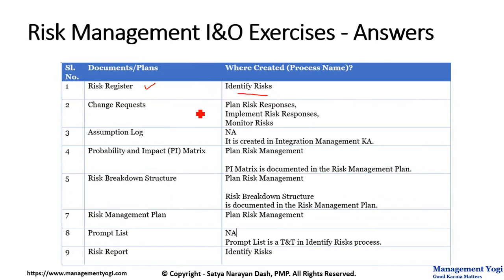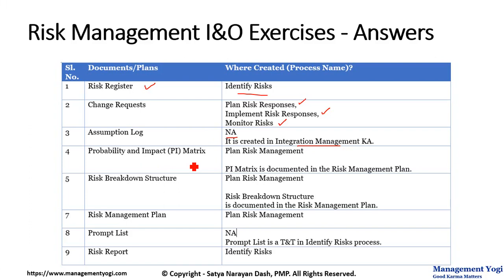Change requests are documents, though they are separately mentioned in the PMBOK Guide and other standards. Change requests are the output of three processes: Plan Risk Responses, Implement Risk Responses, and Monitor Risks. Next, the assumptions log is not created in risk management — that is why it is 'not applicable' — it is created in the Integration Management knowledge area. The Probability and Impact matrix (PI matrix) is not a separate document; it is documented as part of the risk management plan.